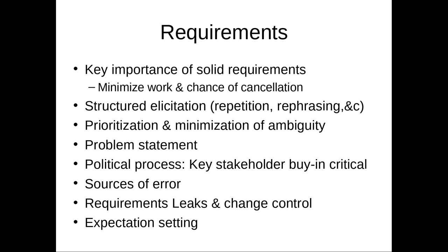In expectations, I said one of the most important things in this class is actually the importance of setting expectations. Same deliverable, same client, same amount of time may be viewed as a grand success or a dismal failure, depending on the expectations of the client to whom you deliver. If they expected it 10 times earlier, they may be hopping mad getting that same deliverable. If they were expecting something would take a bit longer than it did and you deliver early, they'd be happy. It's just a lot of the difference is expectation setting.